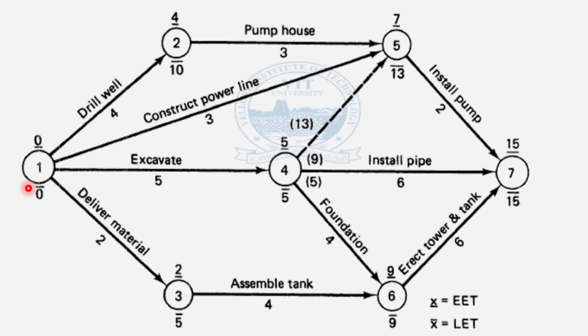Now you see, that means when you come by this root, you don't have any free time. There's no free time, there's no slack. So this automatically becomes the critical root. I can come like this, but I could have come also the other way around. But had I come by that root, I still get a slack of 3. Okay, so this is the way by which we see which will be the critical root.